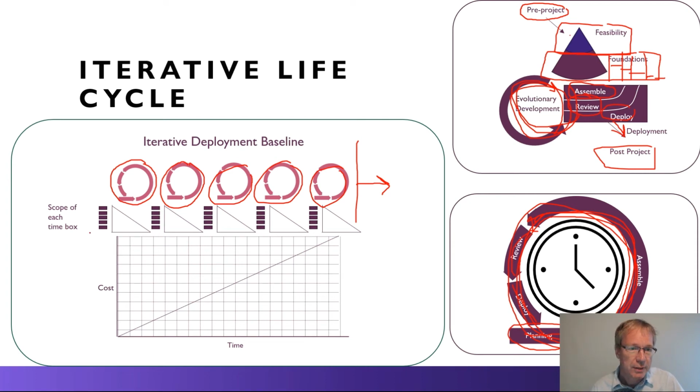And then for each iteration, we usually prioritize the functionality that we want to develop during each of those phases. So in this stage, we may focus on fundamentals of the data science or data modeling or the analytics that we want to run, the databases we have to use. And then in these latter iterations, we may move the focus onto the graphic user interface or ergonomics of using it.